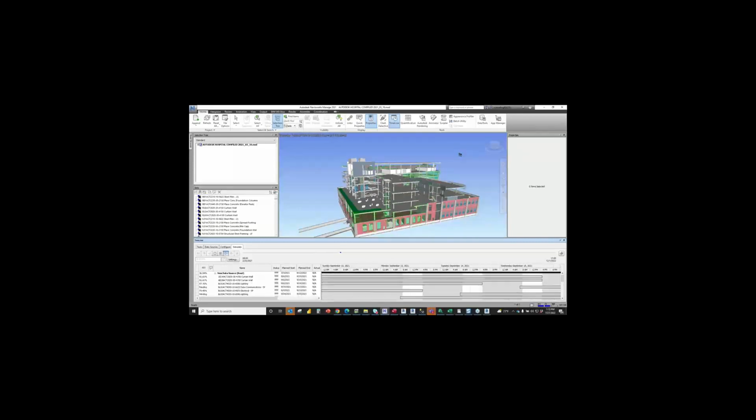Now, without that methodology, I would have had to manually create about 1,400 selection sets and manually link those to tasks. And I was commenting to Vince that my experience suggests that doing that manually, well, that's 2 or 3 weeks worth of work to really get that produced. And there can be some starting and stopping, having to do things over again if you don't digest the model first.